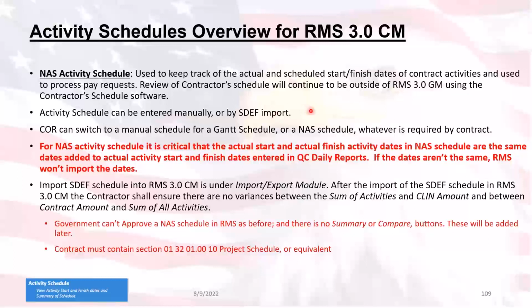Here, change here, change there, and then you're constantly having to go in. Okay, what changed? Is that good? Am I okay with that? I don't know. And you won't necessarily know if your contractor doesn't tell you that they've made a change. So it's probably better for everybody involved if you use an SDEF import in order to get your activity schedule. That's my personal opinion.